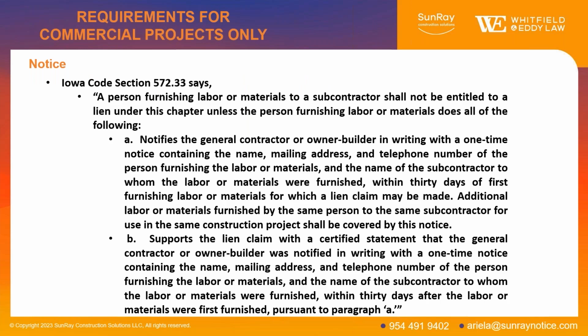those. Okay, so I mentioned earlier that there's differences between the requirements for commercial construction projects and residential. And I'm going to talk about a requirement that applies only to commercial or non-residential projects, and it's a notice provision. First off, it applies to people or companies furnishing work to a subcontractor. Okay, so these are lower tier subs. It does not apply to a subcontractor who has a contract directly with the general. Okay, so these are people like a supplier to a sub or a sub to a sub, those kind of lower tier